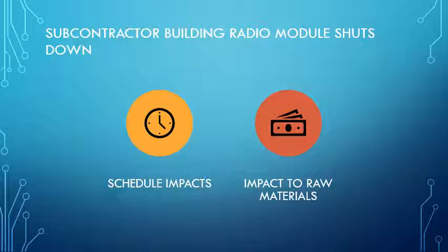Deliverables. The buffers created to offset the potential issues with vendors created some of the additional time required to secure an order for a new vendor. The project manager also offered employees in the production department the opportunity for overtime to ensure the project timeline would not be derailed from the lack of raw materials to complete the radio module.